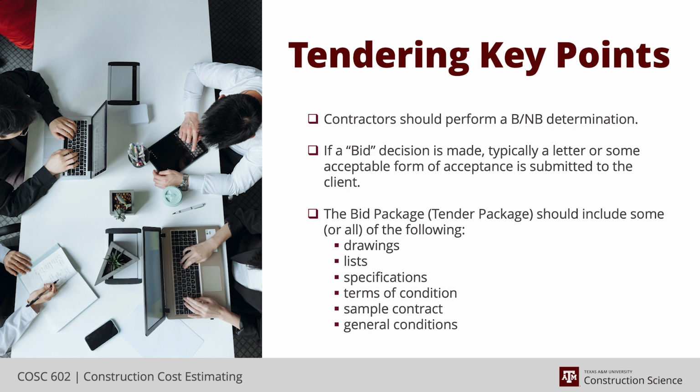Specifications are now being determined. You're so conceptual in FEL 2, you're not going to rely on specs too heavily. In FEL 3, you now know what it is you're dealing with, so you can start using all your standard specifications as part of the work. So we're going to expect to see that in the package as well.